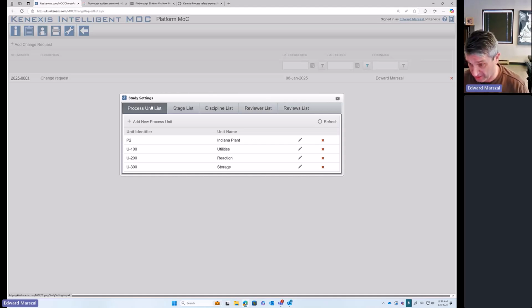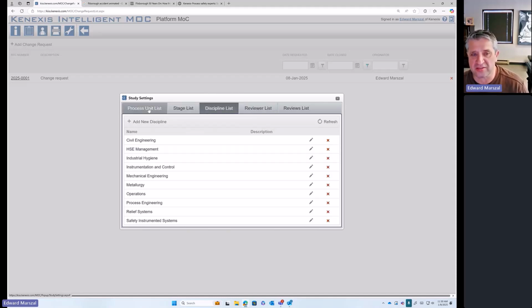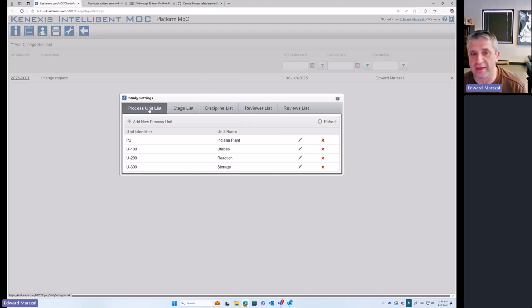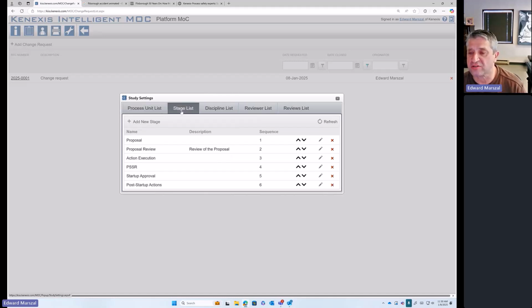And one particular customer of ours, who is the reason that we wrote this software, has 5 sites that are all very small. So they will only be using one study for all 5 of their sites because their sites are really small. But I expect something like large petrochemicals or refining, you're going to want one study per physical site to prevent this reviewer list, discipline list, and process unit list from getting unwieldy. And also for large organizations, the MOC procedure from one site to another site is different, so your stage lists are going to be different.